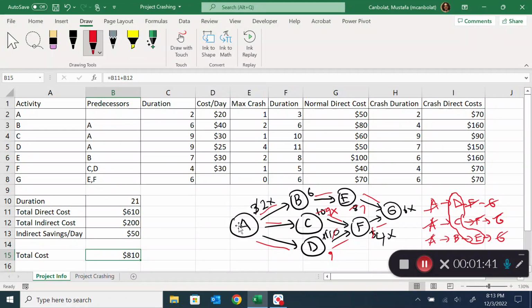We could do the same thing for the beginning and put a start node with zero duration. The first one could be a kickoff meeting with zero duration, and the last one could be your celebration with no duration. So it helps you to build your model.